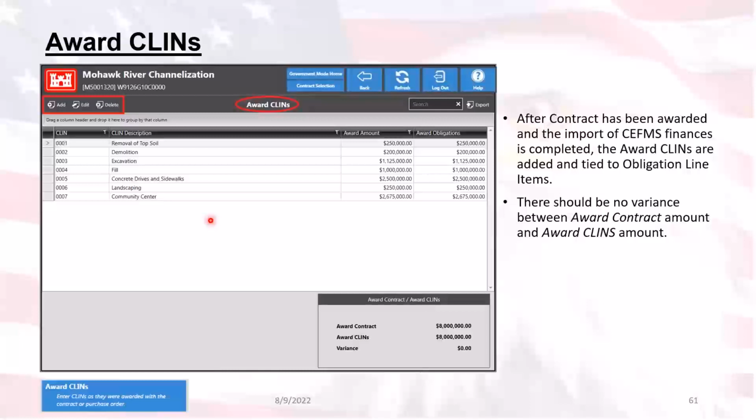So if it's already been paid on, if a modification has already been done to it, done. It's finished. So when you set up the contract, make sure you double check and verify that the information you set up is correct before you start making payments. Because once you start making payments, trying to go back and fix it can cause a lot of work, and we want to prevent that kind of stuff. So double check your work up front to save yourself a lot of work in the long run.